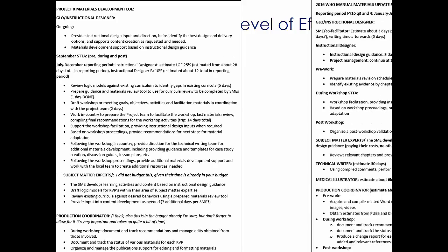One of the first things your instructional designer will help you do is to take your project details, for example, project scope, budget, timelines, and provide a proposed scope of work and level of effort breakdown for all those involved. On the screen, you see several samples rotating in, and I'll show you where to find those in a minute.